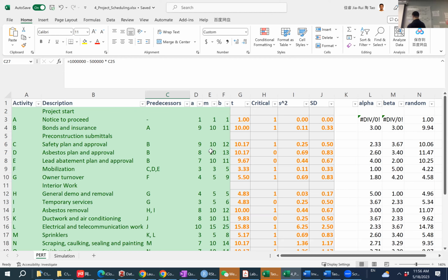However, notice that when I calculate the expected duration of the entire project, I pick either one of the two to be calculated in the total duration, because during the same time, C and D can be completed, right? So they don't take the time one after another, but instead they can be done in parallel. So in that way, doing C while doing D doesn't cost another round of duration.